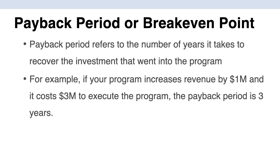The next formula is payback period, or break-even point. You don't need to calculate this because it is quite complicated — this is not a CFA exam after all — but you do need to know what the payback period means. The payback period refers to the number of years it takes to recover the initial investment that went into the program. For example, if your program increases revenue by one million dollars and it cost three million dollars to execute, the payback period would be three years.